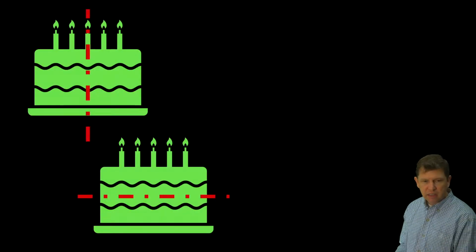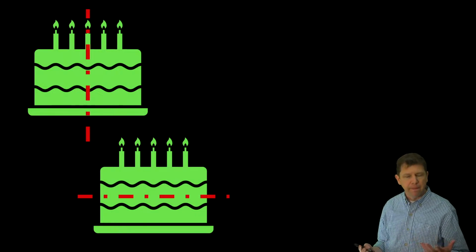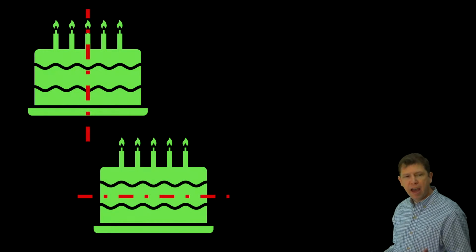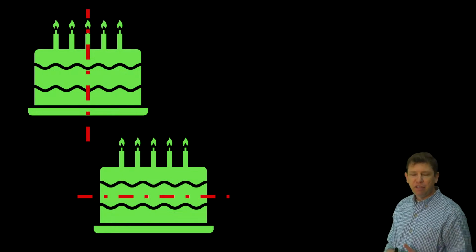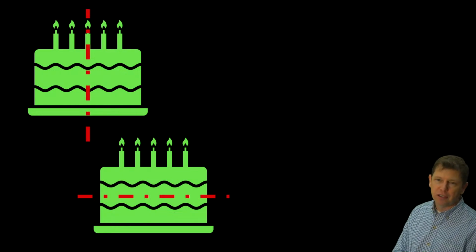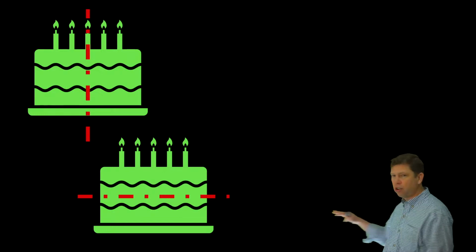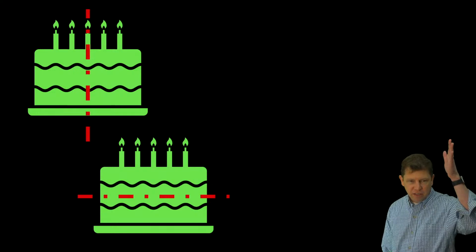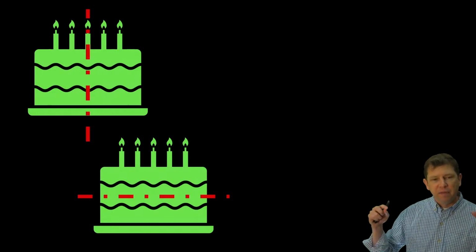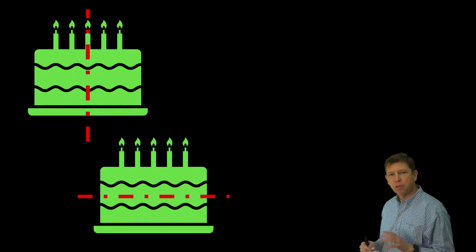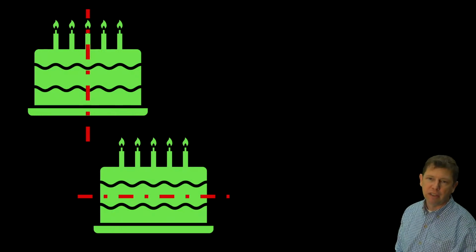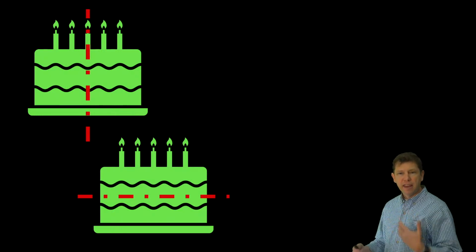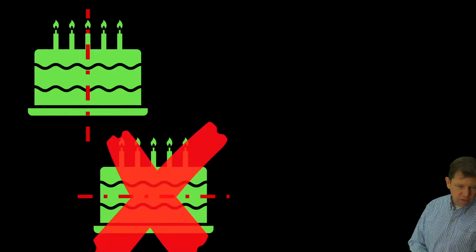If you think of it kind of like a cake, one of these ways is slicing it like this, an entire cake. Maybe pie might be better, but imagine that you get a pie and you want to experience the pie. You're the user. If they just give you the crust and say, okay, eat that first, that's not going to be very satisfying. What we really want is something all the way through. Yes, I like the key lime pie. You wouldn't want to eat your key lime pie layer by layer. If you're wanting to show your customer that you're making progress, don't give them just an empty pie crust. Give them a slice all the way through that they can actually experience. So you want to avoid this.